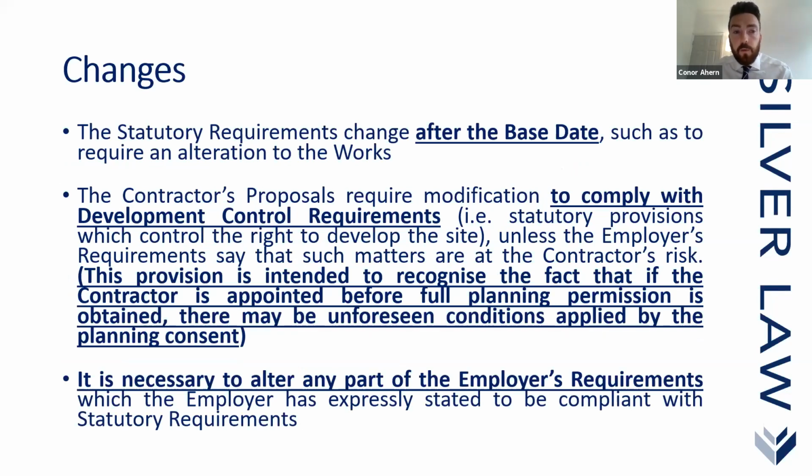So if there's been changes, in the event that the statutory requirements change after the base date, such as to require an alteration to the works. A lot of people ask, why do we need a base date in the contract? And the base date largely relates to the updating of the statutory requirements. So you will see that most base dates tend to be in and around when the contractor receives a tender inquiry, or maybe sometime before the contractor actually starts on site.